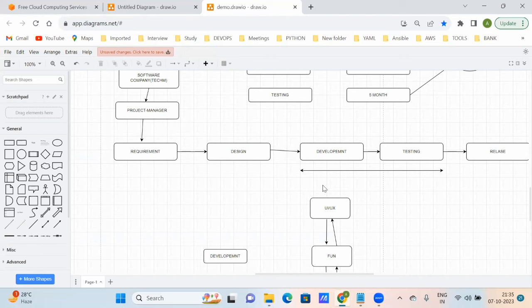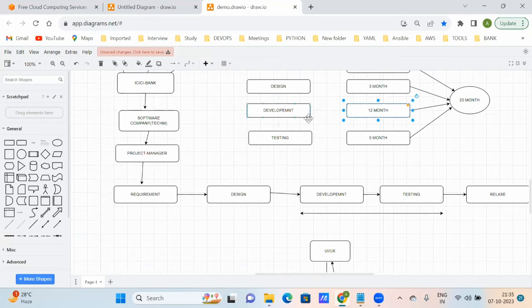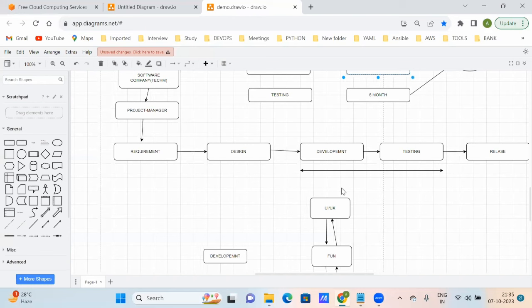In the agile process, let's say development takes 2-3 months or this one year, correct? In this one year, they'll do the work per module. For one module, they'll take one sprint. A sprint is a minimum of 3 weeks. So every 3 weeks they'll release something. Once they release, whatever issue comes, the testing team will test it, correct? They can fix it immediately, so that for the next sprint that issue will not come, correct?